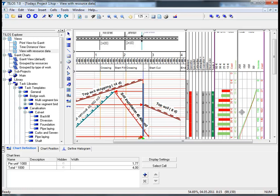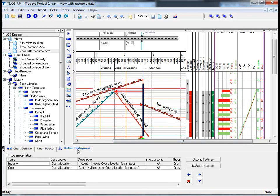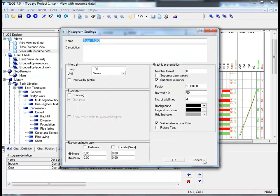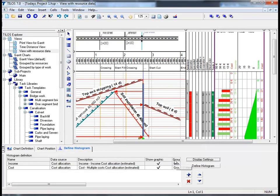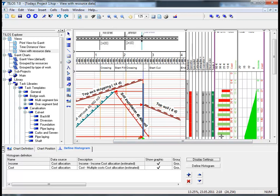In the details toolbar click on the define histogram view tab and then select display settings. I can tick the box next to stacking and grouping and by confirming OK I can now see that during the first weeks of our project we have taken in more money, more income in green than we have incurred cost displayed in red.